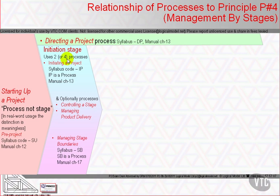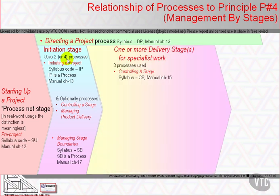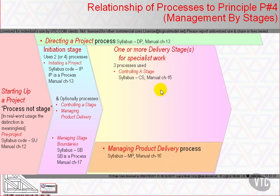After the initiation stage there are one or more delivery stages in which specialist work is carried out by team members, possibly operating through team managers using Managing Product Delivery (syllabus code MP). This process has three activities to control and report on their work, and it interacts with the project manager via Controlling a Stage (syllabus code CS, manual chapter 15).